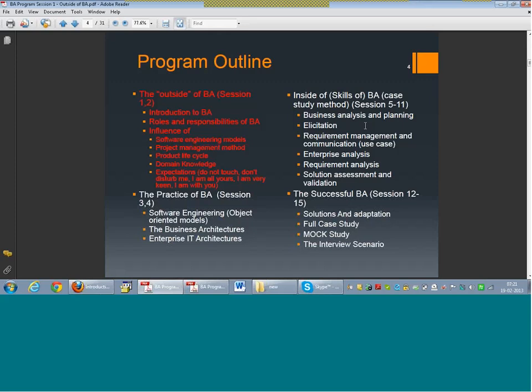If you see the project management process, project manager is the one who need not have technical knowledge ideally, and he should be only focused on the project management aspect, which is primarily planning, tracking and reporting. He has two different, let's say, strong pillars in this team. One is the technical architect who needs to ensure that the project is delivered on technology and on technical factors, and the business analyst who is primarily supporting him on customer management and the requirement management or functional management. So this is the three pillar model that typically most of the projects work.